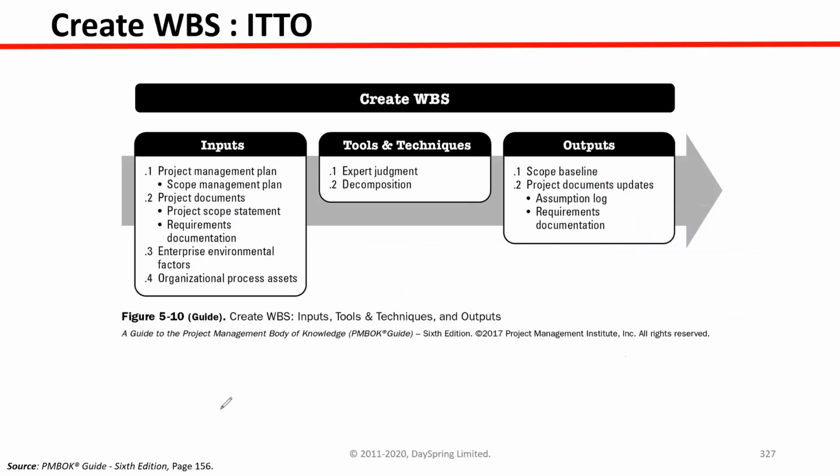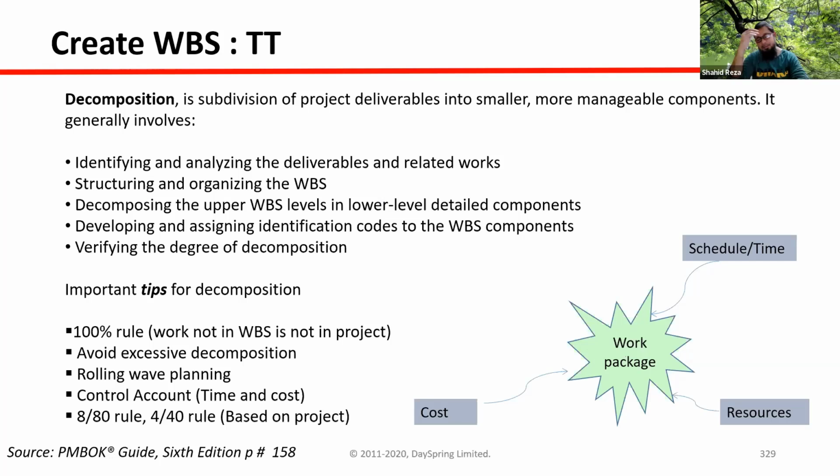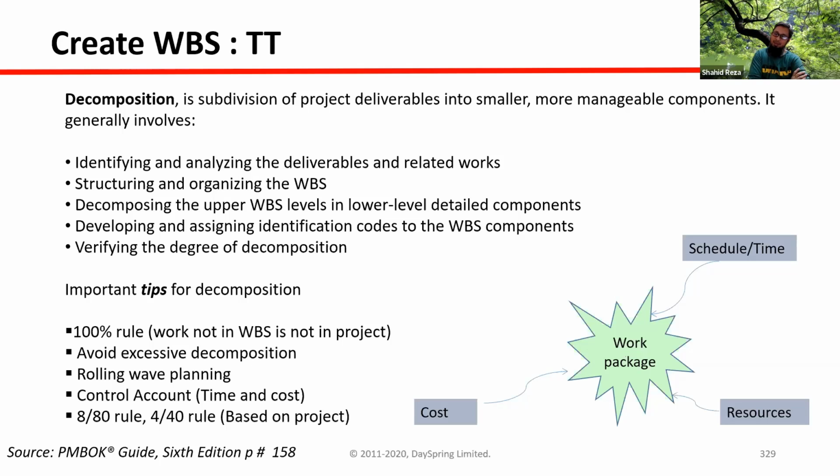Reza bhai, as long as project managers are within the baseline, they do not have to refer to anybody, right? Mostly right. If something happens that exceeds the baseline, then they have to escalate that to the upper level. Otherwise, it is their responsibility to manage this.